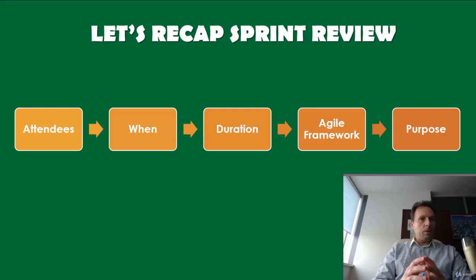And a final word of advice. For teams that are new to sprint reviews, there's a strong temptation to bleed the sprint review into the retrospective. A sprint review is an independent ceremony from a sprint retrospective, so take time to enjoy the fruit of your labors. Liberally celebrate accomplishments. Effective sprint reviews build up the morale and motivation of the team.